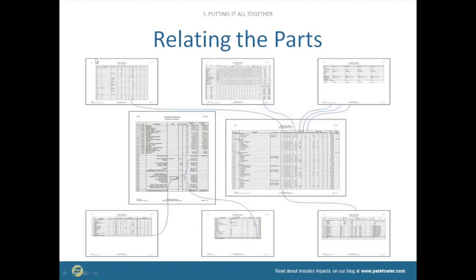But everything else, all of the labor rates and the quantity takeoff and the calls that you make to subcontractors or to material suppliers, all gets connected to the estimate details. So all the way down, this estimate is for $127 million, and that is going to be on the summary page. And the reasons for that, each boom, boom, boom, you've got all these details.